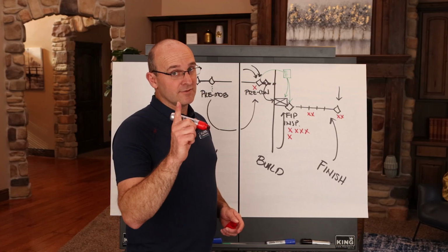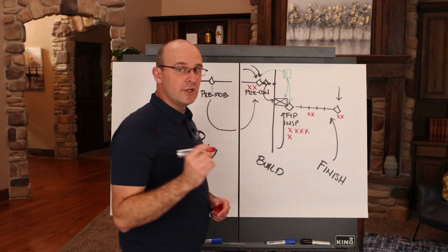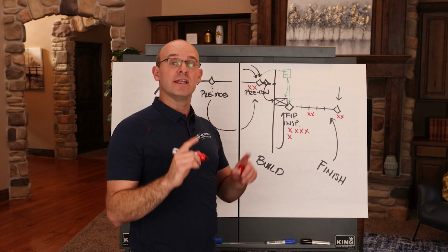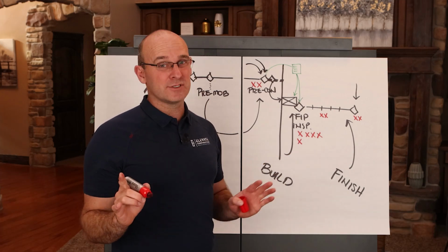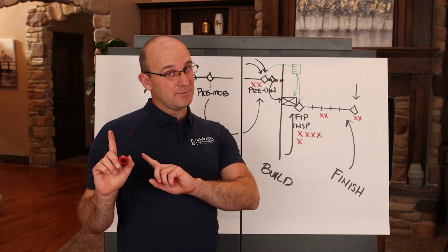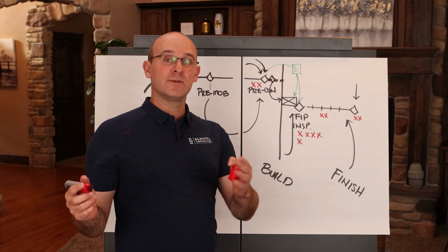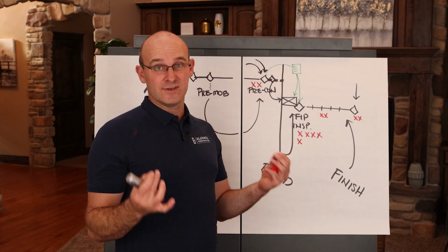Now, this is very key. In the pre-construction meeting, if we really go through a deep dive and assessment of the work, we can pretty much identify at least 80% of the things that historically go wrong. So if the mistake has happened in the past, we can assume that it will happen again because we're anchoring to a representative example, okay?